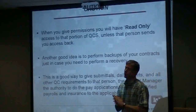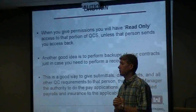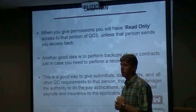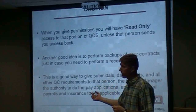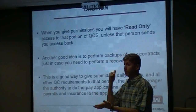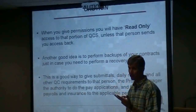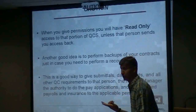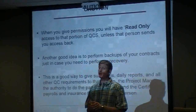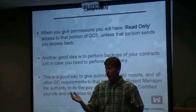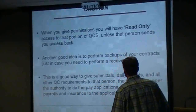If you want to fully use the system, you really should be importing and exporting daily with us. Because if you do a submittal today and don't send an export until Friday, we're not date-stamping it until Friday — whatever we get last, either hard copy or electronic copy, is when your date starts. So if you think your 14-day or 21-day turnaround on a submittal starts earlier, it's whatever the last one we receive.